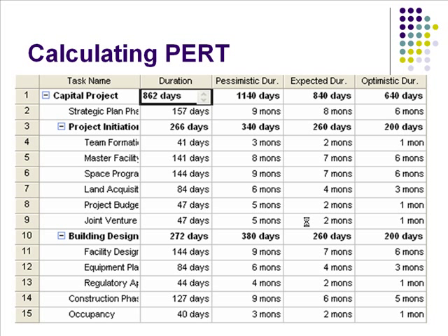Using the said PERT function, this slide shows the PERT calculations that resulted. All of the durations were rounded up to the nearest full day to get the durations that will be used for the project analysis. As highlighted, the PERT, or planned duration, of the full project is 862 days.